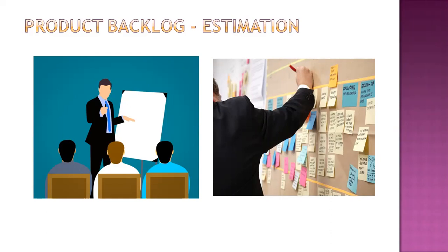That is very important. If you have that level of information, you are allowing your team to understand most of the things, and they will be asking so many questions. And from there, you will be able to achieve 100% clarity on the work item. That's why, with user stories, we follow the 3C principle: card, conversation, and confirmation. Basic things at least should be available in the work item before we jump into the refinement meeting.